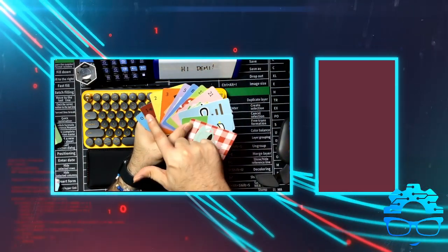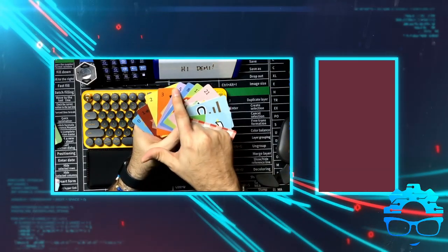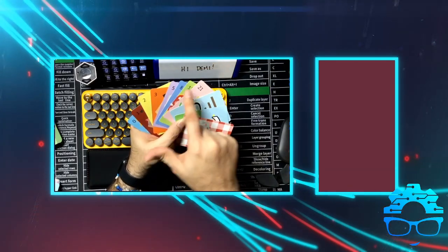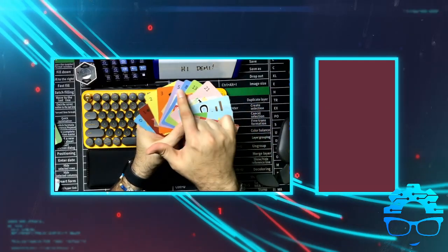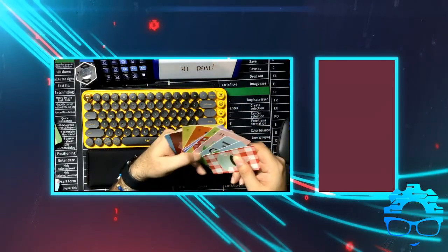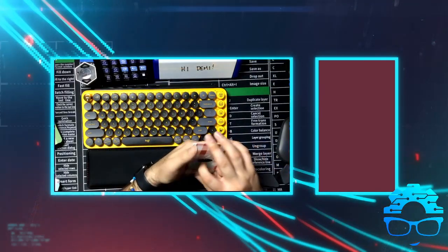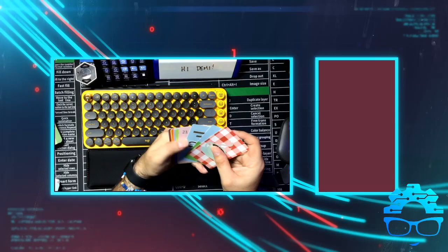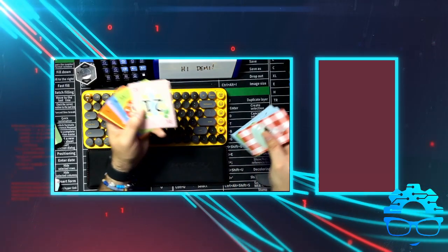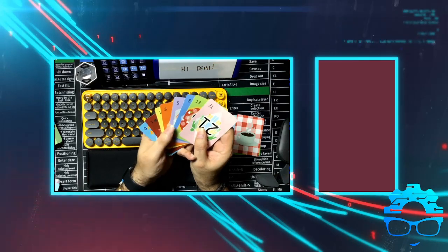We have 2 plus 1 is 3. 3 plus 2 is 5. 5 plus 3 is 8. 8 plus 5 is 13. 13 plus 8 is 21, otherwise known as the Fibonacci sequence, for those of you who are developers, or I guess mathematicians. I'm sure they're aware. And it's meant to sort of demonstrate the complexity of a task.